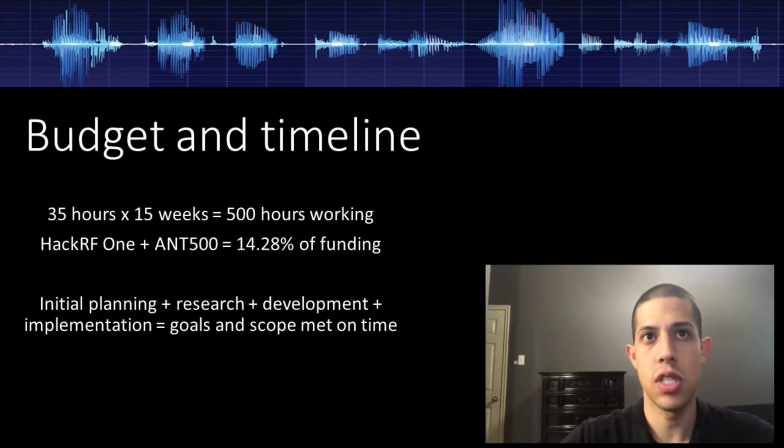Now, I am going to discuss the timeline. The four major phases were initial planning, research, development, and implementation. While working on the project, we had to make schedule adjustments to make room for development. The most notable changes were the removal of the Prepare Progress Presentation task, shortening of the Prepared Demonstration task to 9 days, and lengthening the implementation, testing, and addition of functionality task by 24 days. The original schedule was made in anticipation of such changes for the sake of building the project.